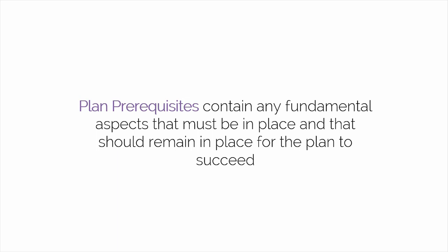The first stage involves making necessary arrangements for the conference, such as finalizing the venue, the speakers, and the logistics. The second stage involves holding the actual conference. Hence, finalizing the venue and the speakers are prerequisites to holding the actual conference.